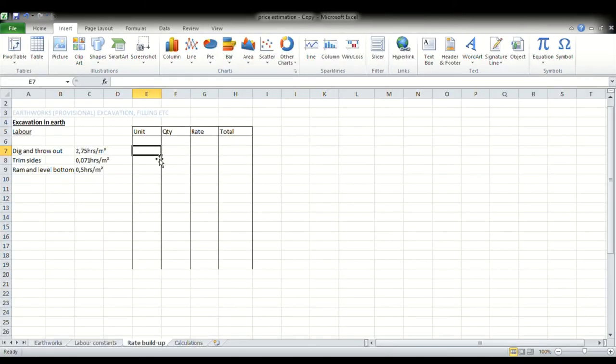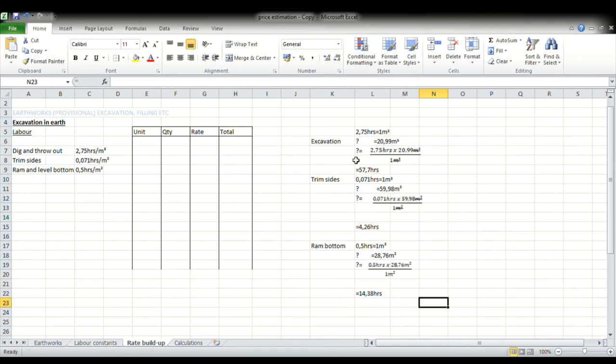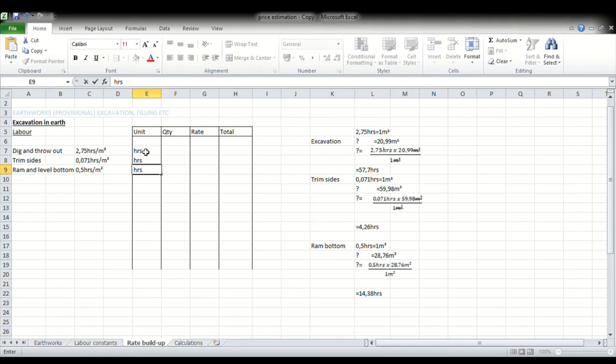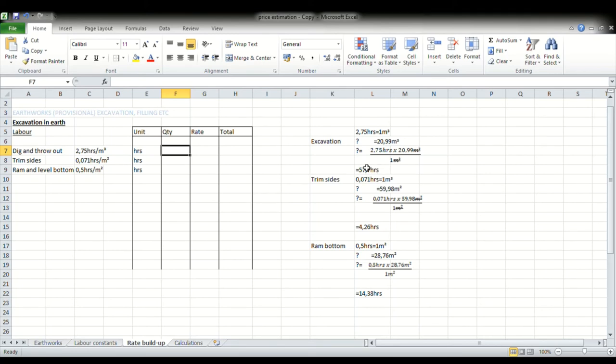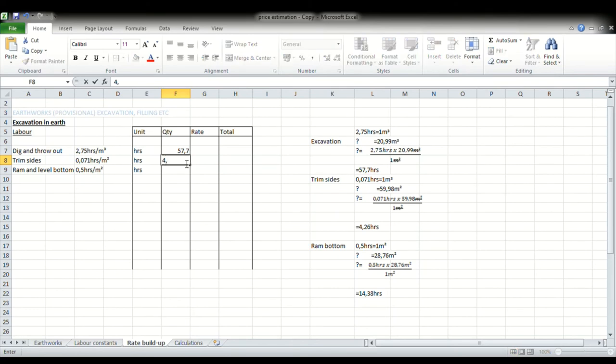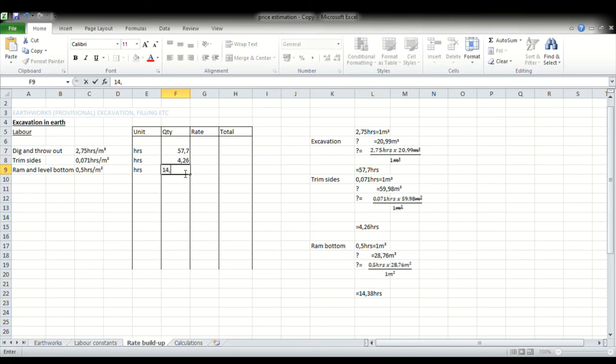So what I am just basically going to do is I'm going to take the table from Word and then place it here of our calculations just to make it easy for us to refer to our calculations. And there you have it. So for excavations, it's 57.7 hours. I just want us to put our units down. So our units for excavations: hours, for trim sides: hours, and then that one as well, it's hours. Now for our excavation, it would take us 57.7 hours to excavate 21 cubic meters of our trenches. So we go 57.7 hours, and then for trim sides, the hours that we have there are 4.26 hours, and then we have 14.38 hours.